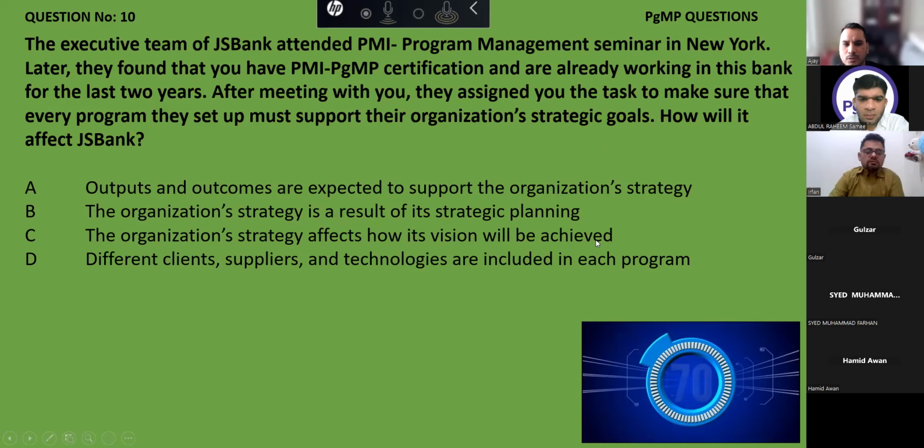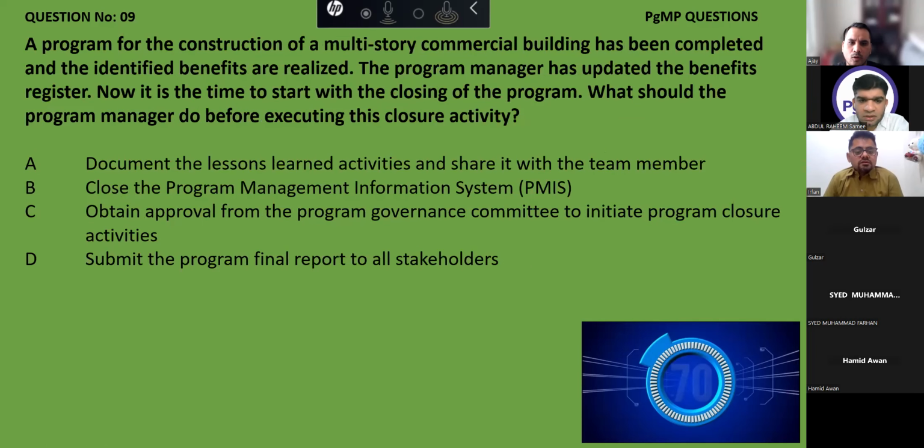Abdul, the very first one says document. Sorry, if you can go back. Yes. Document lesson learned activities. That happens throughout the project. But if you have retrospectives, then we can have a hybrid model. In that case, we are doing it in every retrospective meeting or sprint meeting also. But if it is a predictive life cycle, then document lesson learned is at the end of the project.